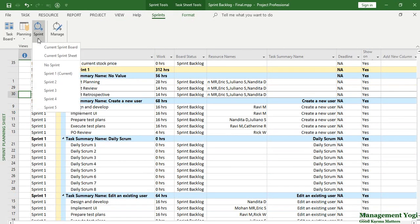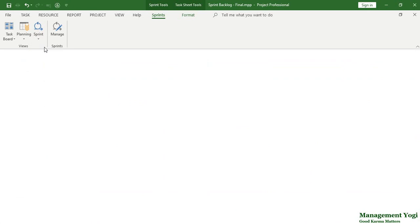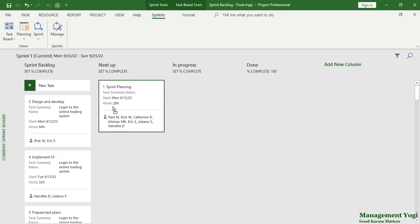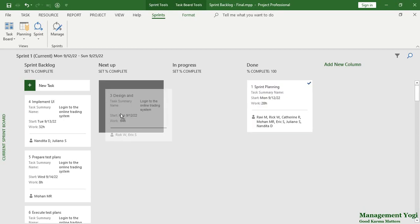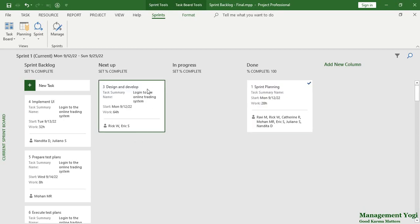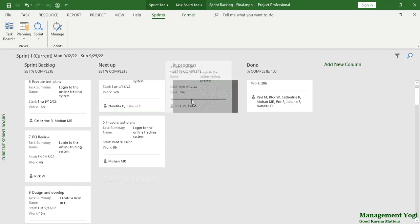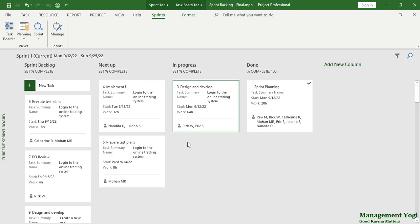For that, go to the Sprints tab, Sprint command, Current Sprint Board. As you track your project, simply drag items — for example, Sprint Planning is done on the first day. Design and Develop are in progress for the feature item 'Login to Online System,' which is the task summary name — I have customized this card to show that. You can drag 'Prepare Test Plan' and similarly complete other items. With this, I believe you will get a better understanding of working with Scrum projects in MS Project with its agile features.